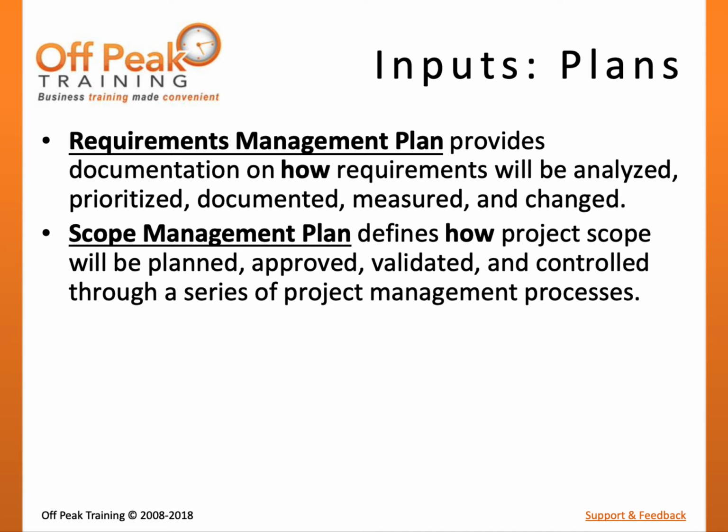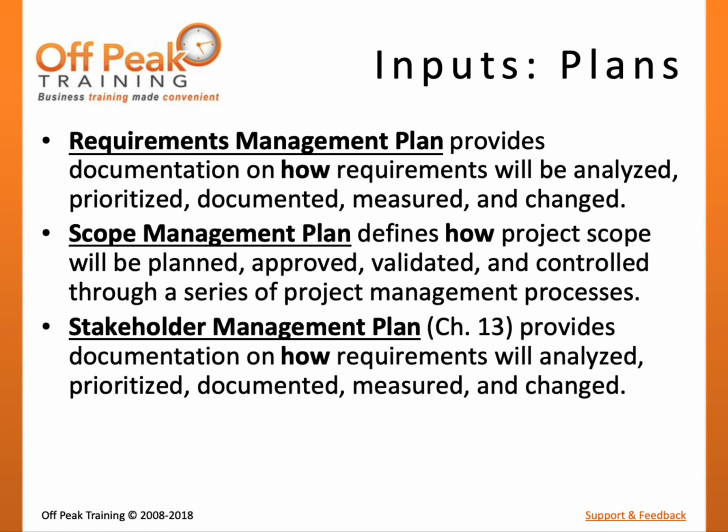The Scope Management Plan provides an overall documented approach to the planning, monitoring, and controlling of project scope. This may be useful since the collected requirements will lead into other scope planning processes. Finally, the Stakeholder Management Plan is also defined as an input, since stakeholder engagement will be key to successfully managing the product requirements and overall project scope.